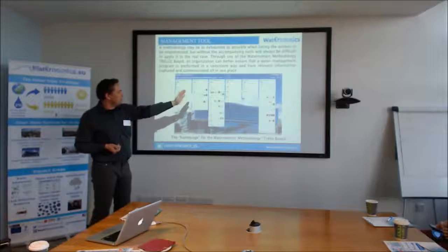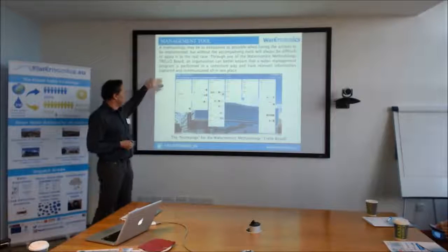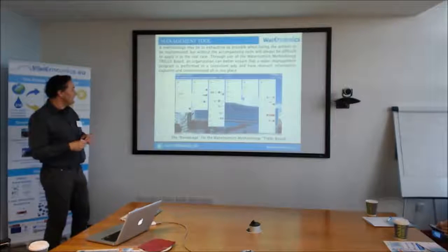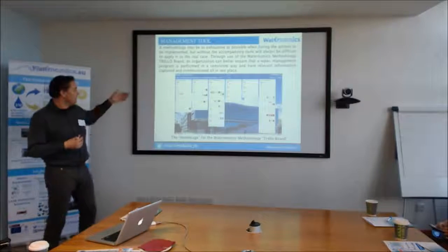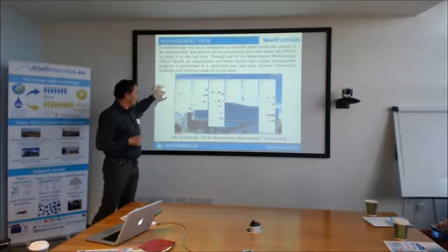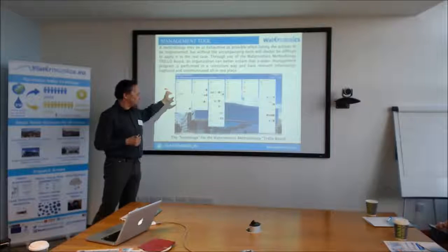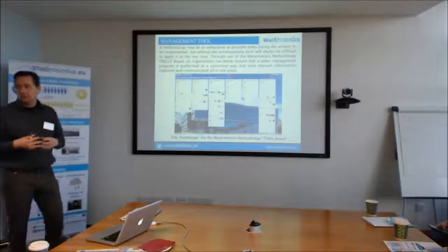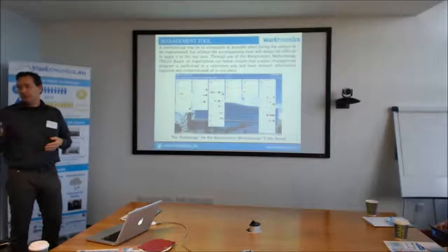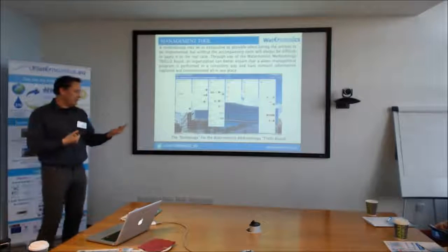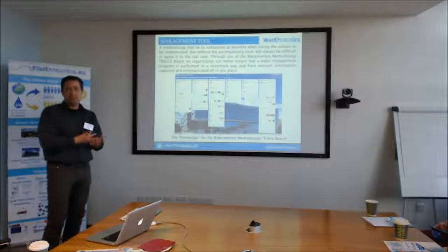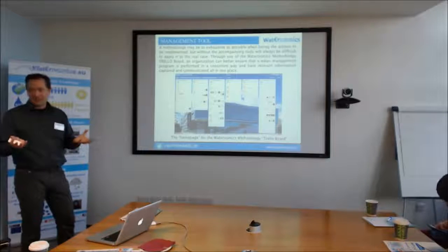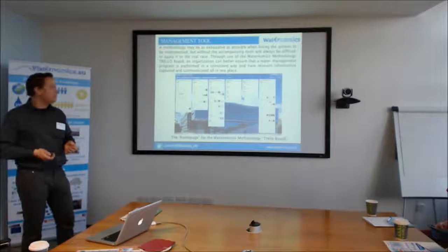So you may recognize already the phases that we have in the methodology. So what we did is we completed a kind of template for the whole methodology. And for each pilot, we kept on tracking how it's going with the assessment, with selecting the activities, with the metering plan, with the strategy, with the implementation. And in that way, especially for the pilot manager, I think this was useful to see, okay, in Greece they're going well, and in Italy they're lagging a little bit behind, but you can explain it. And it's a nice way to keep everybody aligned and involved in the implementation of the Waternomics platform.